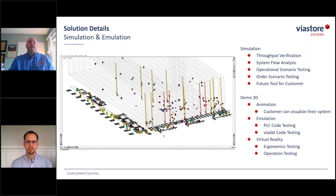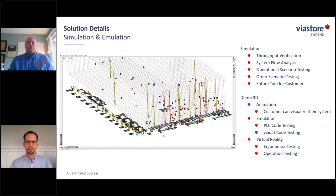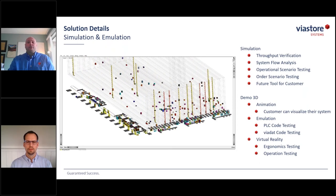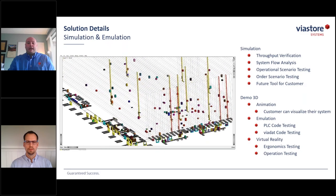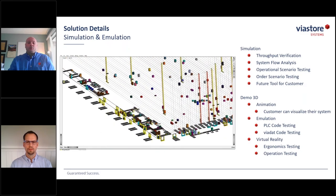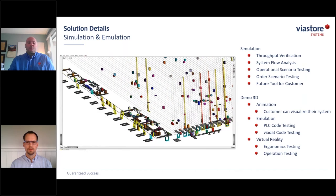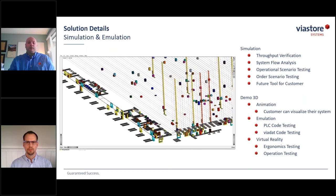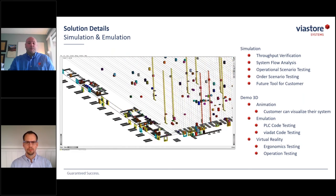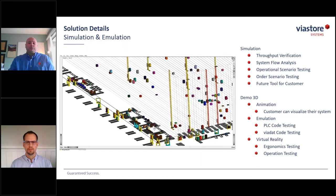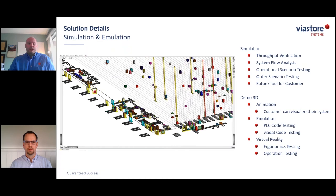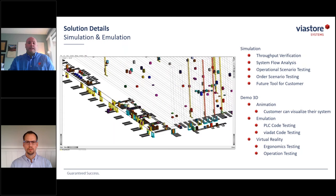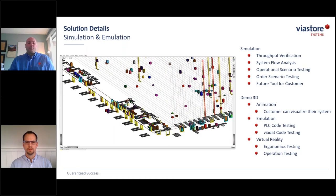The second tool we use is Demo 3D. In the sales and design phase we use it as an animation tool, and we also use it for emulation, which allows us to take the actual PLC code and WMS code and run the system to perform commissioning and debugging before we arrive on site. This makes for an easier startup with fewer bugs. Demo 3D also allows us to create virtual reality environments for operator stations, so operators can test ergonomics and operator efficiency before the system is built.